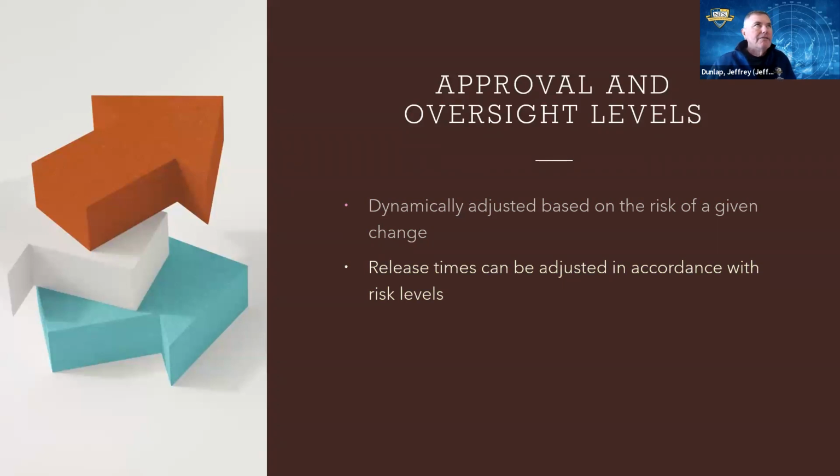So if it's a major change, a major rework in capability, a new something, and we consider this to be higher risk, then okay, pause. Let's make sure we put that in the plan. It's like, this is a high risk item. Let's make sure that we have time in there to do the manual look at this and make sure all of our folks are into this.